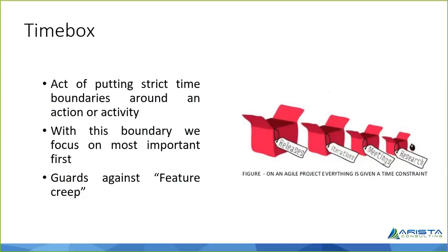But that doesn't mean that you will get additional time after 1 month to deliver whatever you have to deliver. You will deliver only what you have completed at the end of 1 month. You will not deliver all the 10 things. But your time box is over. Your exam time is over. 3 hours are over. You have to submit the paper anyhow, whatever you have written. So whether you pass or fail, that's none of their business.